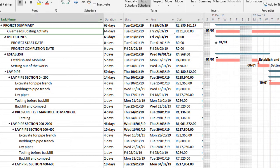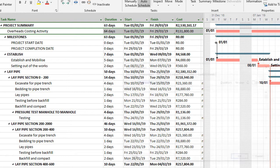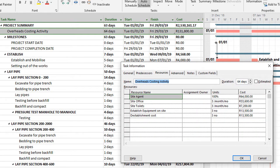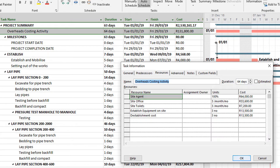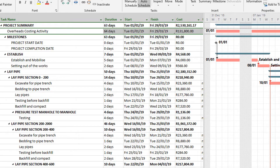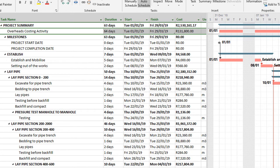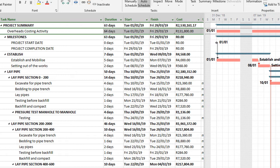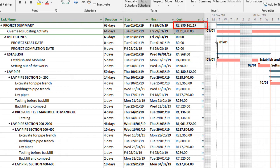Let me show you what I did with the overhead costing activity. I've allocated my site agent, site offices for three months, site toilets three months, establishment of equipment. I've got three pieces of equipment I need to establish and de-establish again. So you can list all those resources on that item. That's the total cost for the overheads. And then it all tallies up to that 2.5 million for my project.